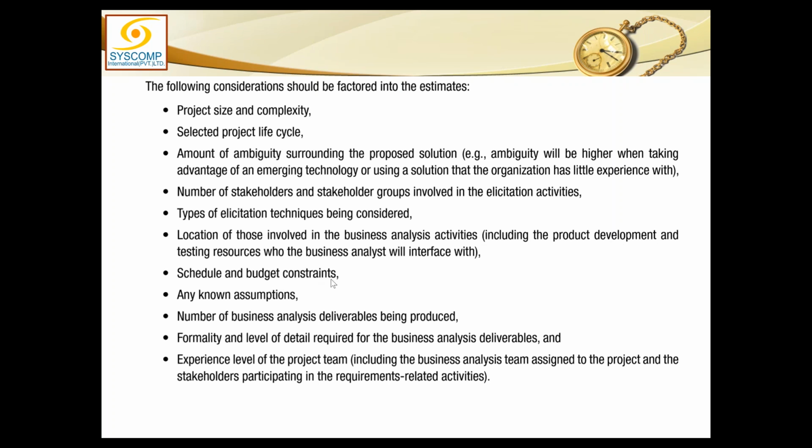Schedule and budget constraints, if any, will also affect the estimate. Any known assumptions. Number of business analysis deliverables being produced. Formality and level of detail required for the business analysis deliverable. And finally, experience level of the project team, and that includes the business analysis team assigned to the project and the stakeholders participating in the requirements related activities.